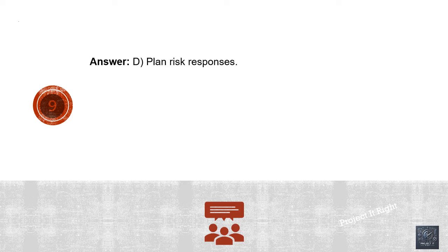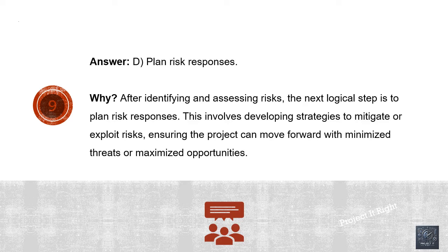Answer: D. Plan risk responses. After identifying and assessing risks, the next logical step is to plan risk responses. This involves developing strategies to mitigate or exploit risks, ensuring the project can move forward with minimized threats or maximized opportunities.